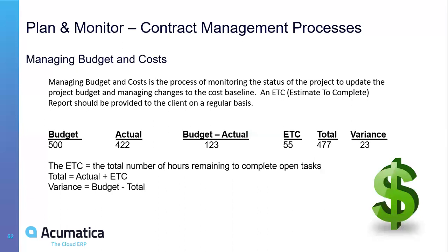So the budget is 78. So 78 is what I have available, right? The 123 here is a wrong number, except if I have some change requests that I'm not aware of, that I don't see on this slide. So I have 78 hours available. So my estimate, ETC, is estimation to complete. For the remaining tasks that we still have to do in the project, I think we need 55 hours. So from my 78 minus 55, if I calculate this right, then the numbers are correct again. This means we still have 23 hours of buffer that we can utilize for other jobs. So we are doing good in this project, and it is fine.